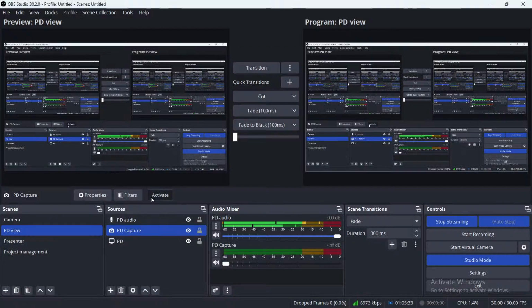Now, for change requests, these are the factors you look at. Number 1, look at the cost impact. What's the impact of the change on my project? What's the impact on scope? Let me type it out. Impact on cost, impact on scope, impact on safety, impact on stakeholders' reaction. How would they react to it? Cost, safety, scope, stakeholders' reaction.